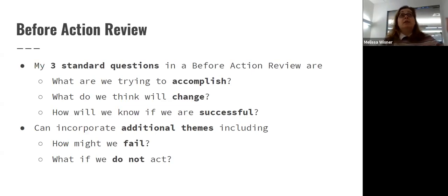So, we made assumptions, or we didn't consider this, and it could be that it's just a one-off thing. Oh, we forgot about the legacy data over here, or some bit of fact. But over time, that might be a pattern. We as an organization fail to think about non-typical users, or we fail to think about edge cases. We tend to just focus our project planning and our thinking on the happy path or the more typical use, and we forget about this kind of thing.